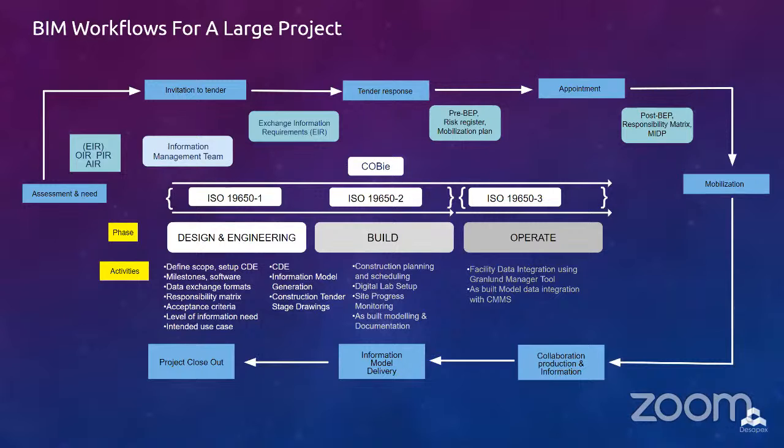Continuously, using the BIM model and the other O&M data gathered, you can refer to this building's performance and benchmark certain parameters to compare with the other buildings in a portfolio. Documenting the lessons learned and the feedback from other stakeholders, the risk involved, the problems, and the issues that occurred in different stages of the project, we can ensure this does not happen in the future projects. This is the key step in the closeout of the project as mentioned in the ISO 19650 framework.